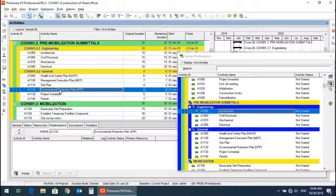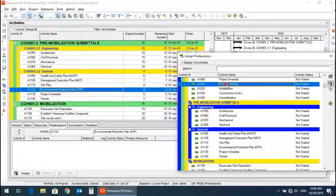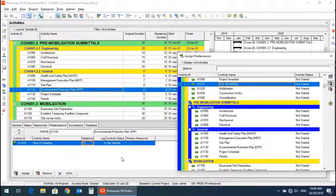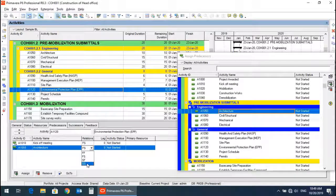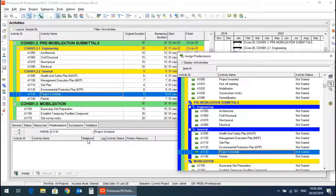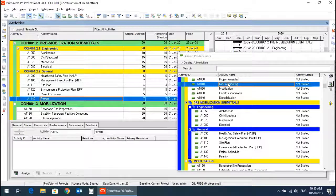The environmental protection plan has a predecessor of kickoff meeting with a start-to-start relationship. The remaining pre-mobilization submittals should also have a predecessor of kickoff meeting. Permits again have kickoff meeting as their predecessor.